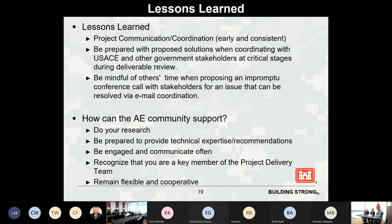One of the things that came out of it is that, prior to being there, we usually develop an agenda. Sometimes the agendas have just general blocks. We want to do interviews at this time. But it doesn't define specific time slots for individuals. I want to see environmental at 10 o'clock, ATFP at 11 o'clock.